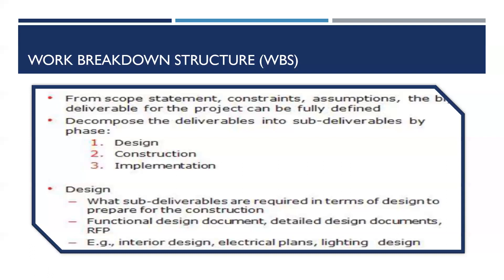For electrical plans, if you break it down further, you might specify how many lights, how many switches, how many outlets, and what voltage — whether appliances are 110 or 220 volts. For lighting design, you specify details such as whether you want a chandelier, or whether the lamp should emit warm or daylight — these are your sub-deliverables in the WBS.